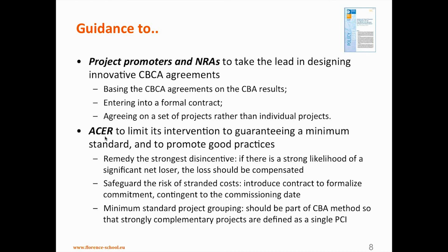The last is this project grouping. Here, what is important is actually the CBA method, because if you read our policy brief on the CBA method, already there we were arguing that when you define a project of common interest, it is very important that complementary projects or complementary investments are considered as one project. And if they are defined as one project, automatically they will also have one cross-border cost allocation agreement.